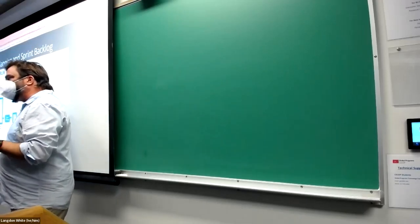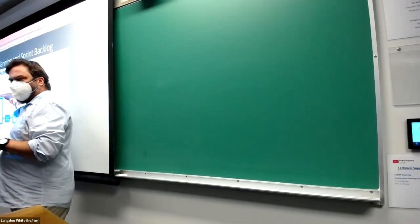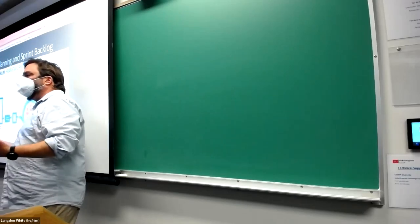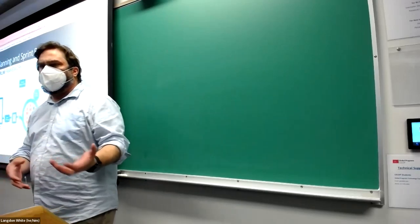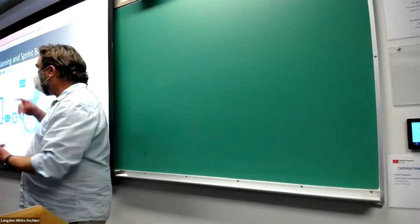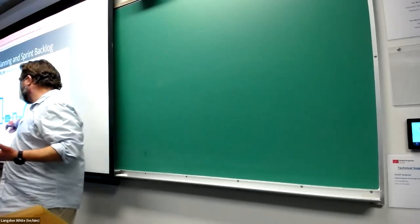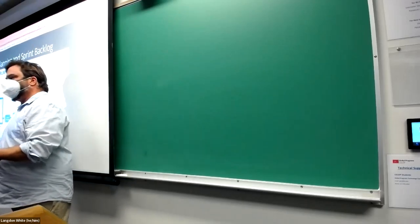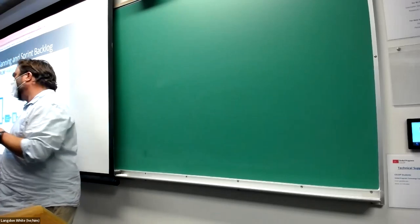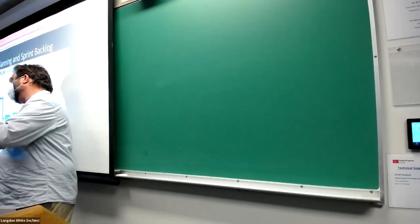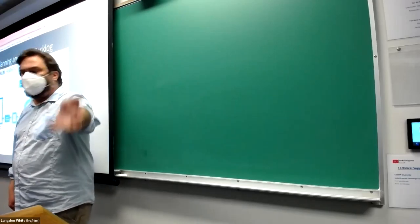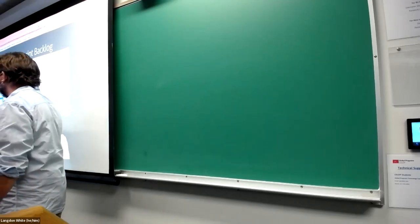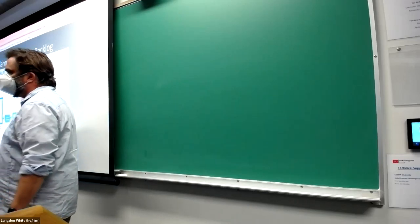Most sprints you'll also have a sprint retrospective: what went right, what didn't go right about the sprint? Did we choose too much for our sprint backlog? Did we not transition well between team members? Did we not write enough documentation or plan enough effort? This is the scrum process.